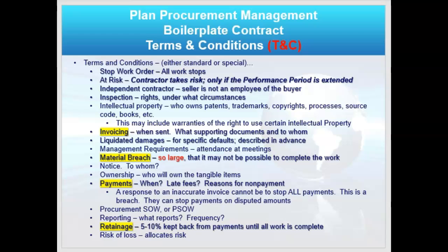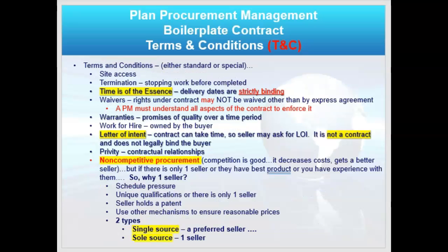Payments. I'm responsible as a project manager for payments. When they're due, what are the late fees? I've got to have money in the checkbook. And speaking of money, I didn't realize the term retainage means that even when I pay the seller, I'm going to retain 5 or 10%, whatever's negotiated, until the work is complete and the books are closed. You'll want to negotiate that too.